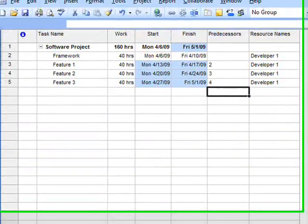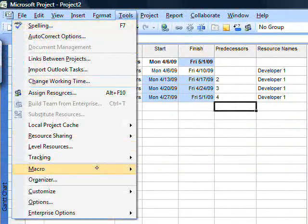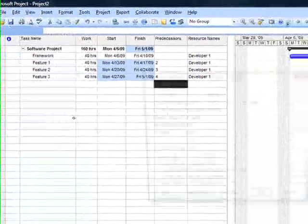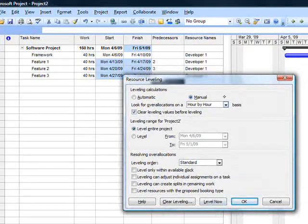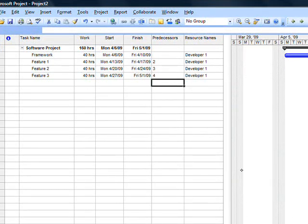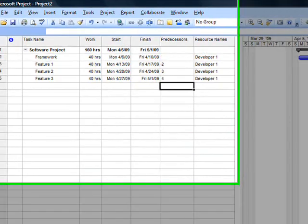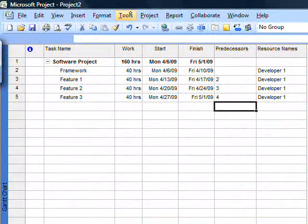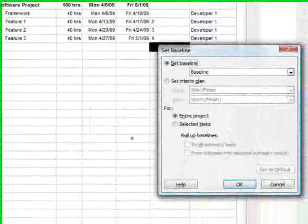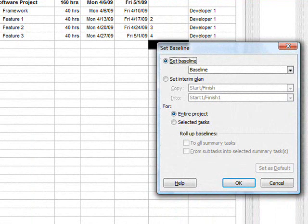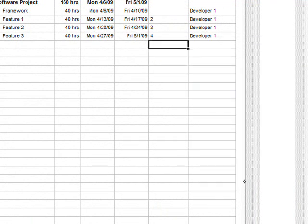Once that's done, level the resources — hour by hour. Click Level Now. Once it's leveled, now we set the baseline. Again, it's very important. Under Tracking, select Set Baseline. You won't get earned value numbers out of Project if you don't set the baseline. Click OK.